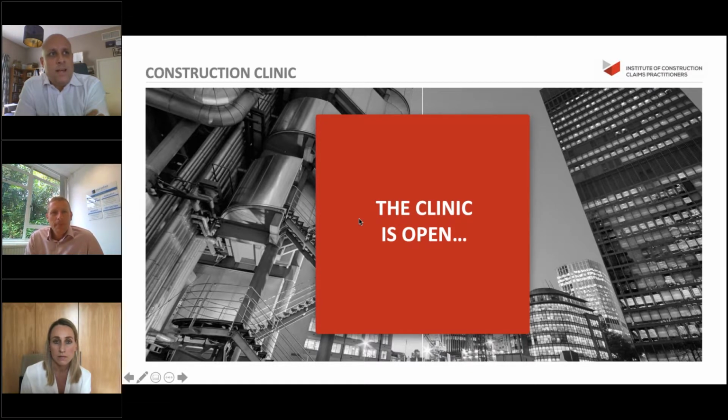Thanks, Daniel. The baseline is the first program that you're going to issue for the contract. The contract asks for a baseline program so you can measure all the works against. If the baseline is not approved, then I would carry on updating that program. Paul? Yeah, again, depending on what contract you have.